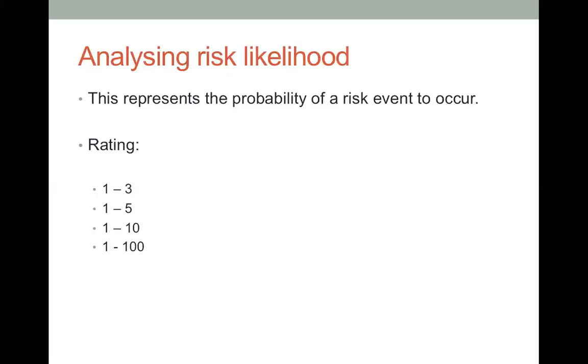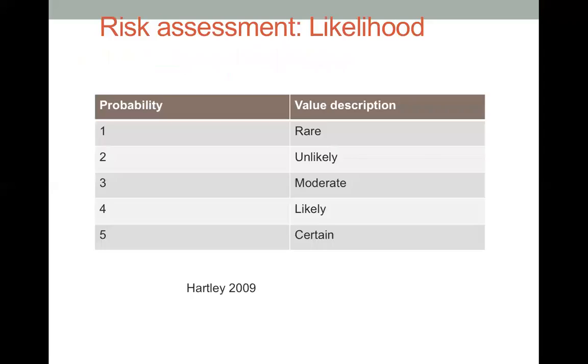Okay, but you can also use 1 to 5 to write the likelihood. Now, if you go back to the likelihood that we discussed before about our competitors reducing their price, our stakeholders may advise us that the likelihood would be 4, because that means the chance for them to reduce the price when we launch a new product is quite high. So it's 4.